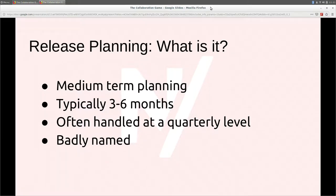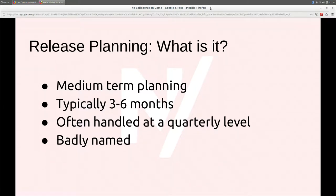It's more longer or medium-term planning — typically three to six months increments. The place I currently work, we do it at a quarterly level; I think that's fairly common. It's badly named because in a day and age where we're doing continuous integration and continuous deployment — or at least deploying more frequently than once every quarter — it doesn't make a lot of sense tied to when you're actually releasing software. But it does make a great deal of sense in terms of having a medium-level opportunity to look at what you're building and develop a picture that your sprints in a given quarter can flow from.